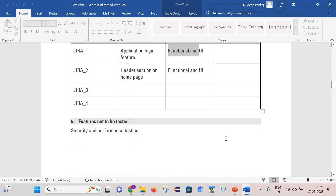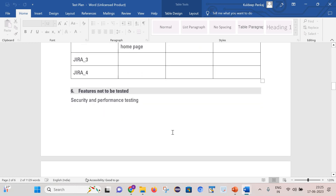The next section is features not to be tested. Anything that is not in the scope of testing should be clearly mentioned here. For example, I have written that security and performance testing will not be part of this test plan.